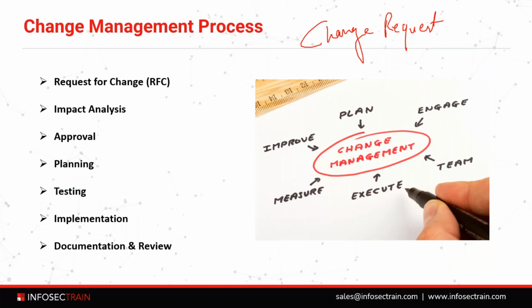So in a formal change management process, the need or reasons for change and the procedure for implementing the change are captured in a request for change form, and it is submitted for approval, right? What that document should include: first, purpose of change; second, scope of the change.